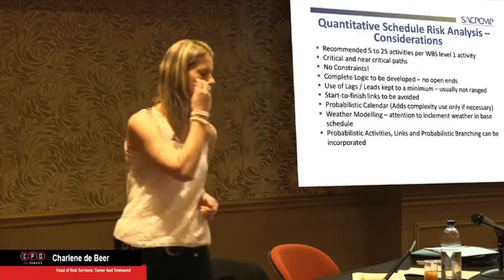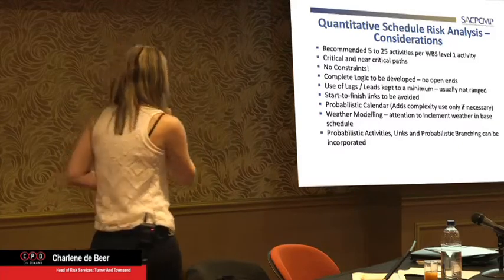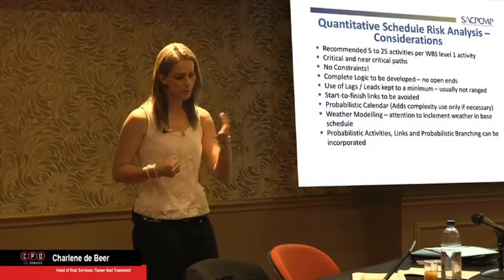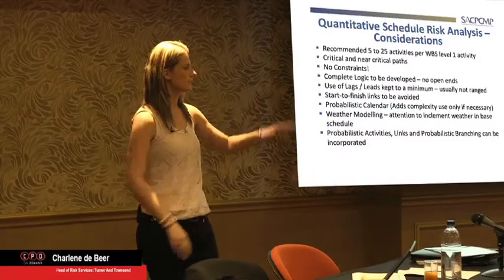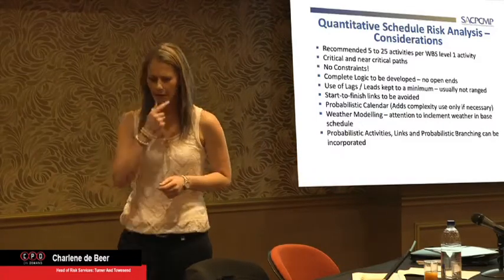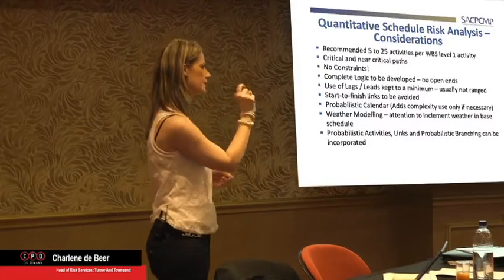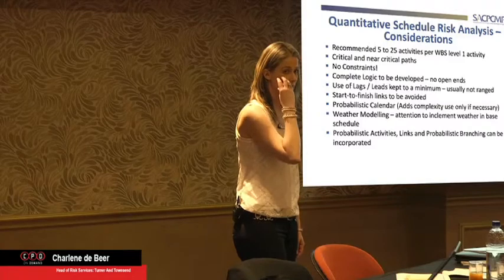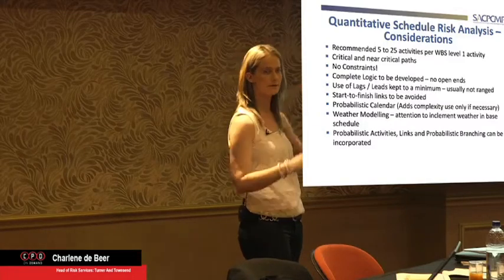So quantitative in a schedule. What we do is we get the program, we import it. It's got your whole schedule. Let's say it's got 5,000 line activities. They've all got activity numbers assigned to them. We take the risk register and we're saying the valves are going to be late. The motorized valves. Where in the schedule do we need to install the motorized valves? Where's the procurement and the installation?